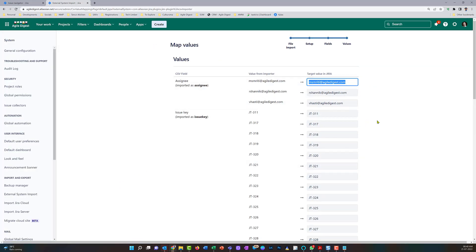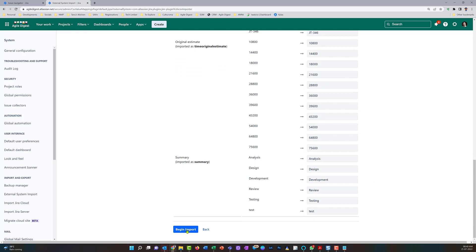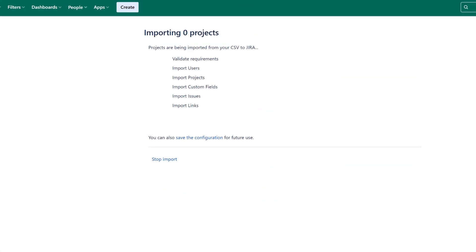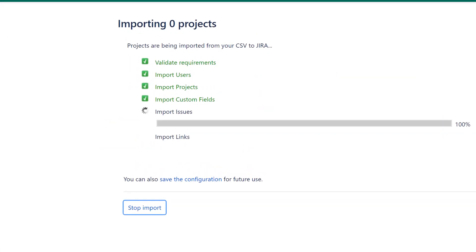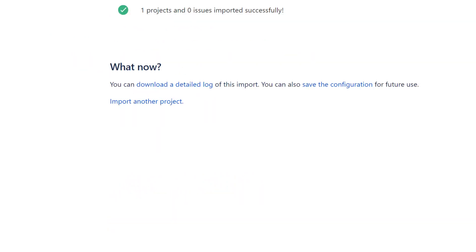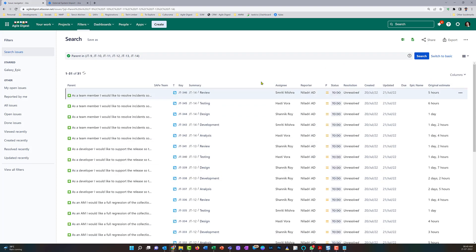This shows a high-level overview of the mapping it will create and all the data it will update. I'll click 'Begin Import.' It says one project and zero issues imported successfully — meaning it has not created new issues but has updated the existing ones. I'll now refresh this filter showing all the subtasks that were unassigned with blank original estimates.